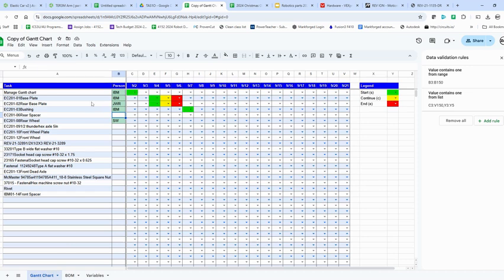And then the key thing is that we need to enter our start dates for the different things. So if today was September 2nd and we're going to be doing 3D printing things today, then I will go through and find the 3D printed parts and go, okay, S indicates that we're starting that. And then tomorrow, when I come in, I look at, okay, the rear spacer.